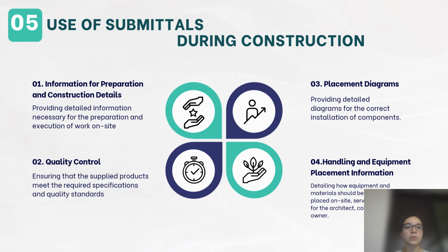Submittals are used throughout construction to provide detailed information necessary for the preparation and execution of on-site work, to ensure that the supplied products meet required specifications and quality standards, to provide placement diagrams for the correct installation of components, to detail how equipment and materials should be handled and placed on site, serving as a reference for all the parties involved.